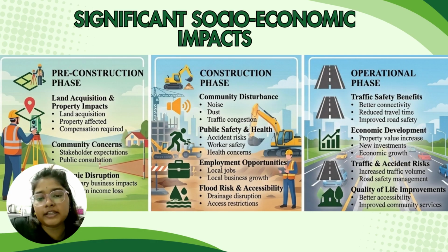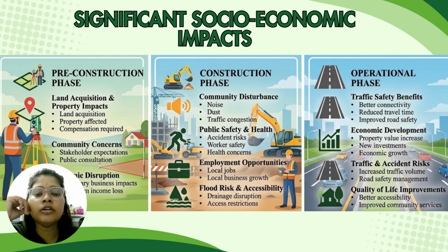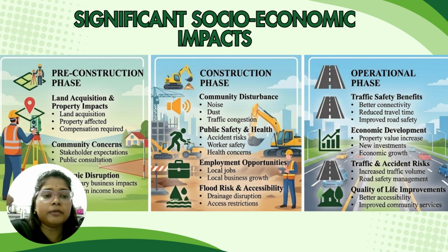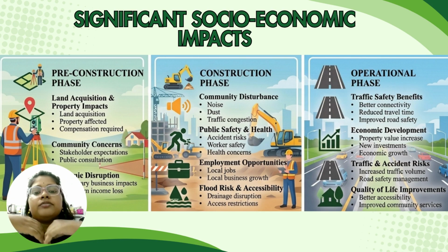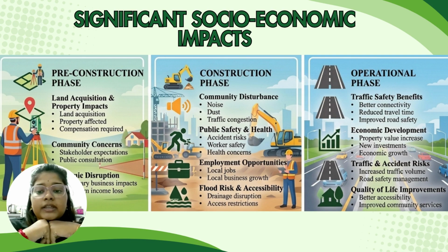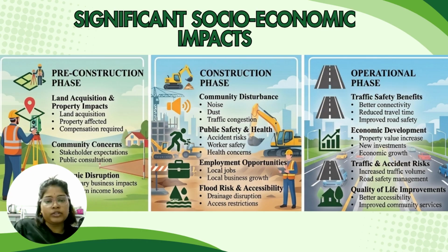Next, I will present the significant socio-economic impacts associated with the proposed road construction from Kampung Bukit Ko to Medan Jaya, Marang, Terengganu. The socio-economic assessment focuses on the impacts that may affect the local community during the pre-construction, construction, and operational phases. During the pre-construction phase, land acquisition may be required for the road reserve. This could affect the landowners through the loss of land, property, or existing economic activities. In addition, local communities may have concerns regarding the compensation, project implementation, and also future development plans.